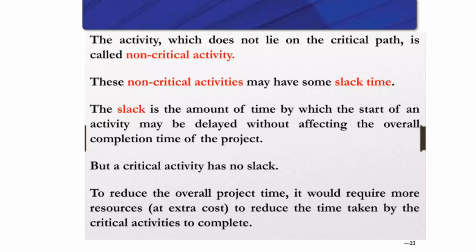So anyway, these are the meanings of slack time and critical activity, but this also gives you the indication that shortening critical time could come with some cost, either actual resources, actual people's working hours, or actual finance. If people want to finish something quickly, then they have to undertake the critical activity instead of waiting to save some money. That's the balance that management needs to consider.